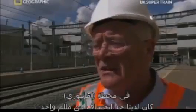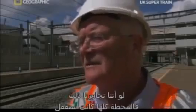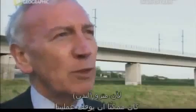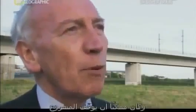The TBM's earth pressure balancing system is designed to keep the ground over the tunnel from settling. Even settlement, the thickness of a toenail, could cost a fortune. Indeed, at Highbury Station, we had a settlement limit of 1 millimetre. If we'd have exceeded that, the whole station would close down. Cost of £25 million a week. And that was very anxious moments, because the London Underground could have closed our operation down, could have stopped the project.